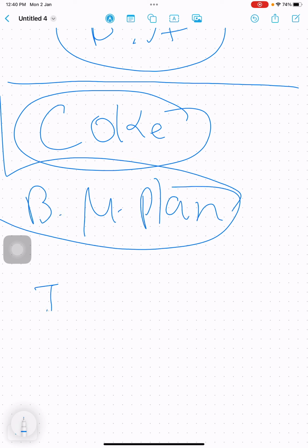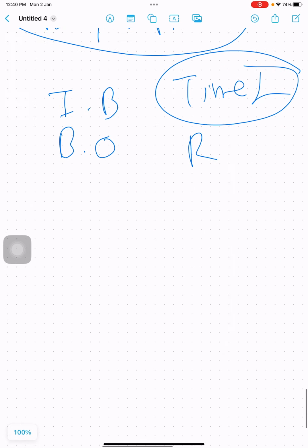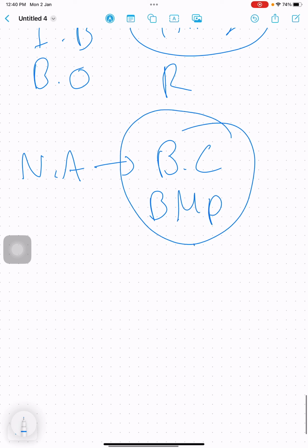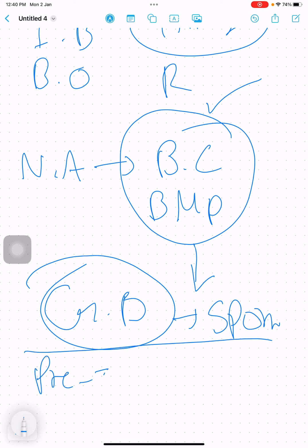The benefit management plan identifies the benefits, who will be the benefits owner, the timeline for the benefits to be delivered, the risks, and those things. So first the need assessment is approved, then the business case and benefit management plan both go to the governance board, and the sponsor of course is the head of that. If that is approved, then we go to initiation. Your pre-initiation activities are completed, then we go to initiation. I hope this makes sense to you.